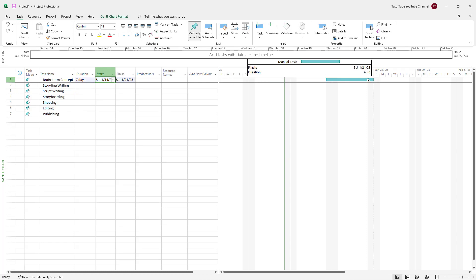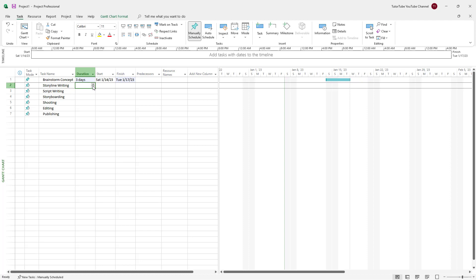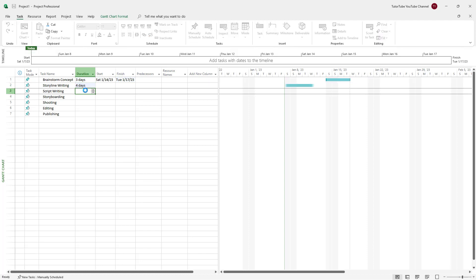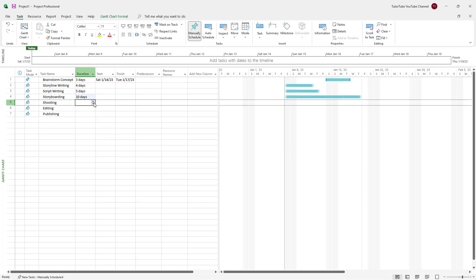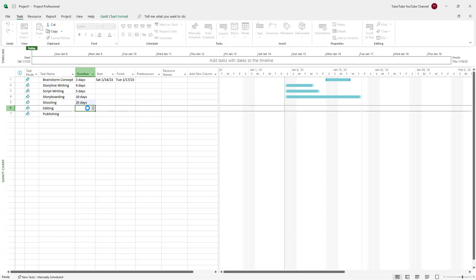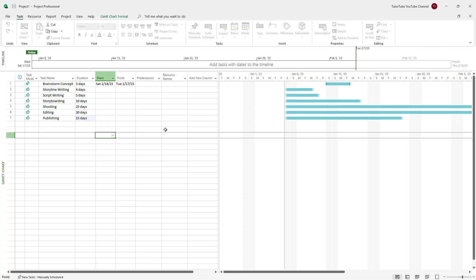Let's set brainstorm to three days. Storyline writing is going to be four days, script writing five days, storyboarding ten days, shooting twenty-five days, editing thirty days, and publishing fifteen days. You can see all of the tasks being lined up in the Gantt chart.